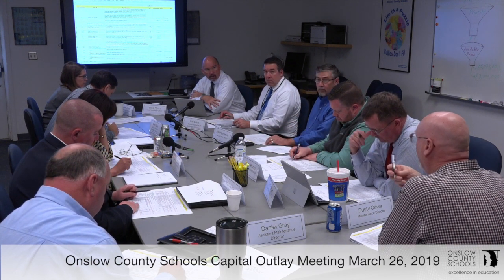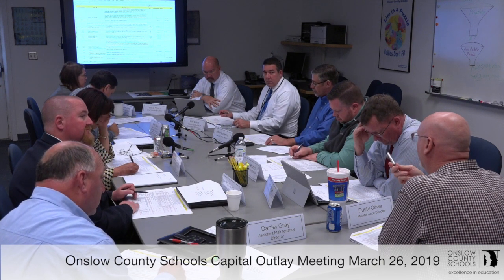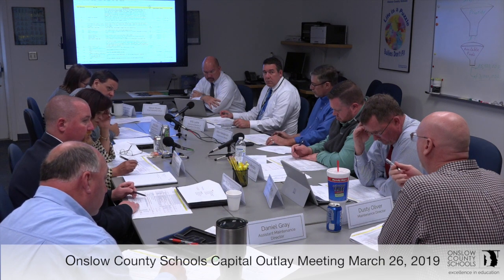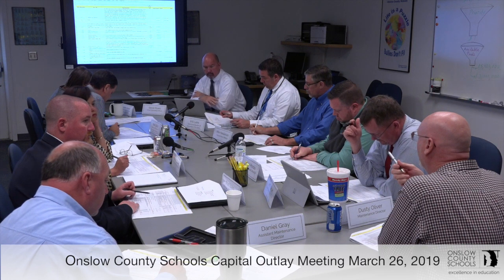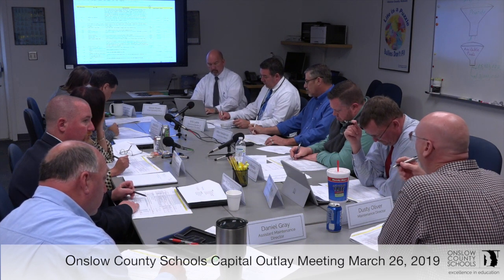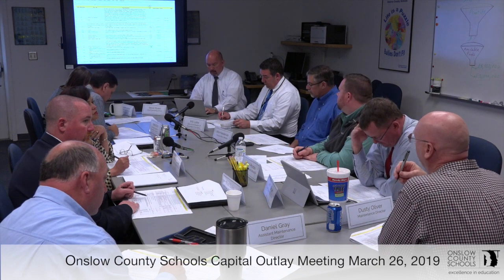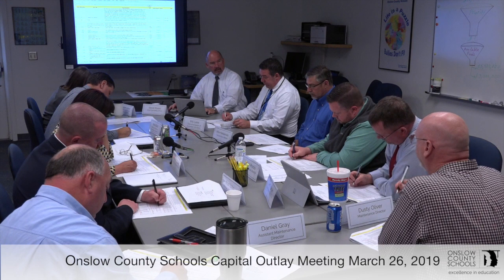We'd have to check with the city planning, because remember they have reduced the number of exterior buildings or even containers that we can have on site now. So if we use up all our allowance on mobile classrooms, we may not have an allowance for another building. All right, we'll do it to be determined on that one. We have to take a look at it and see what it's going to take.